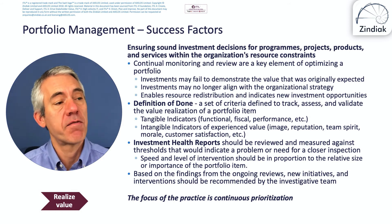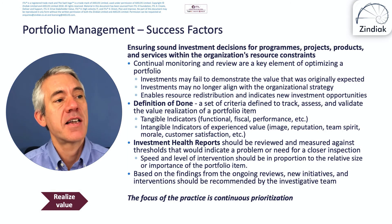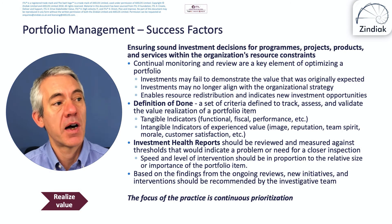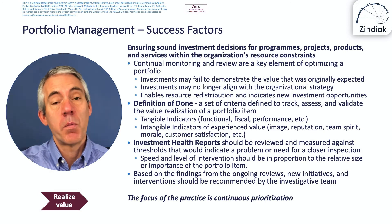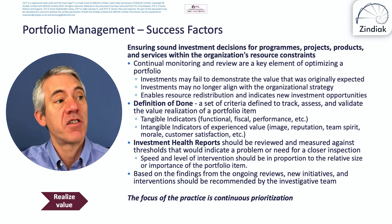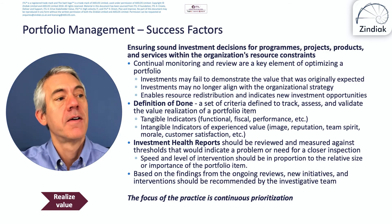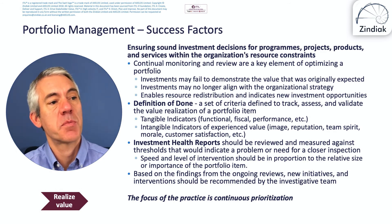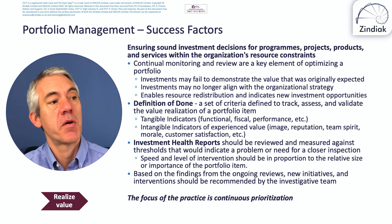Definition of done — from agile — is a set of criteria defined to track, assess and validate the value realization of a portfolio item. When we deliver something, what's the definition of done? How do we know it's complete, finished, done? So tangible indicators — functional, fiscal, performance — and intangible indicators of experienced value such as image, reputation, team spirit, morale, and customer satisfaction. If we're using those, how do we measure them?